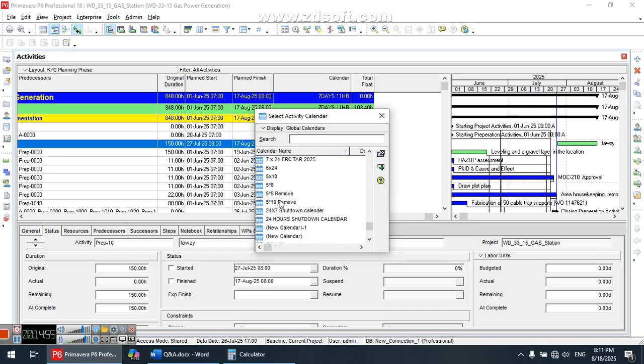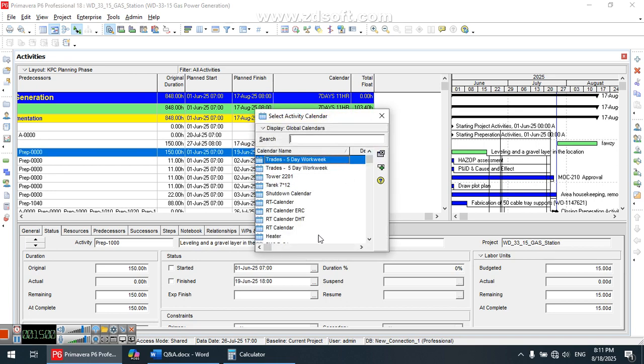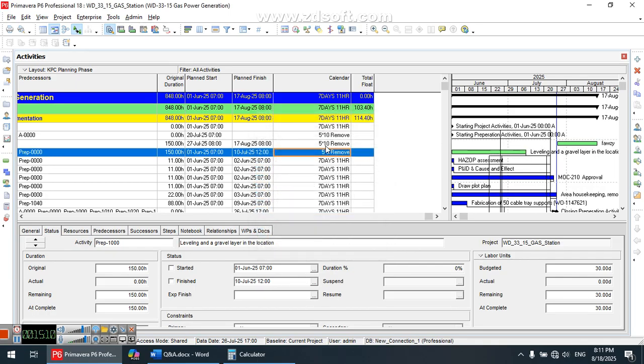Another calendar. And this another calendar. Sorry. So first of all, this calendar, 150 hours duration, and this calendar is 5 days, 10 hours per day, and I put it here in conversion in the month 300, and in the week is 10 multiplied by 5, 50.